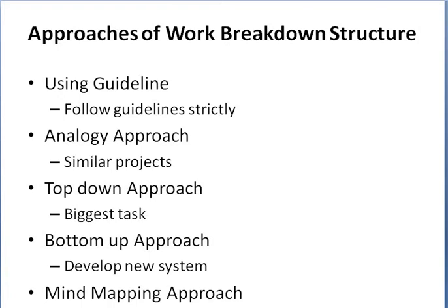Here, each task is aggregated and organized in a summary level, and only the tasks which are present on the higher level are shown in the work breakdown structure. So the team members' brainstorming is done basically in bottom-up approach to identify many activities which are possible, and they are organized into major components.